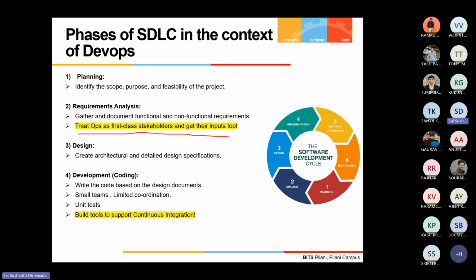That DevOps team should actually be involved right from the beginning of the software development lifecycle, because they also need to plan based on your product and offering what all infrastructure to set up, meaning the databases, the servers, etc., that you would need for your development, for your testing, as well as for production, right? So they also need some time to understand the product architecture and also come up with the right tooling to support each of these.